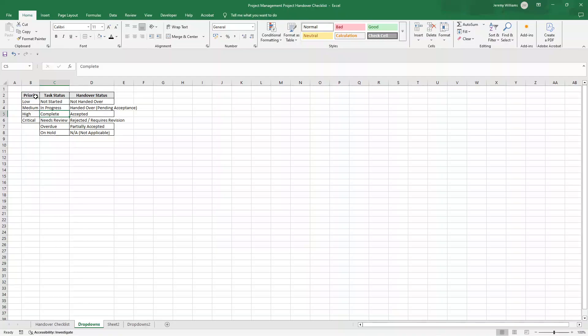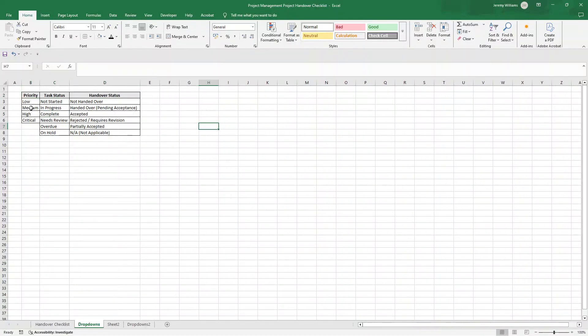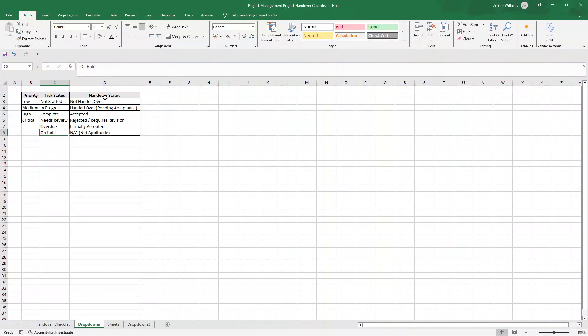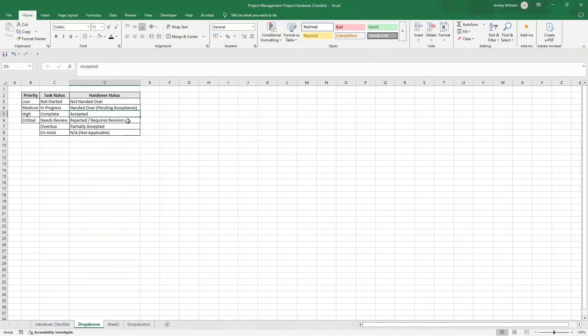I've missed priority. So what I'm actually going to do is just do low, medium, high, critical, because they're going to be our options. So that's what you essentially need to do. Just create this little mapping table. Just give each one a heading and then just put these options in. So we've got low, medium, high, critical for priority. For task status, not started, in progress, complete, needs review, overdue and on hold. And for handover status, not handed over, handed over, pending acceptance, accepted, rejected, requires revision, partially accepted and not applicable.